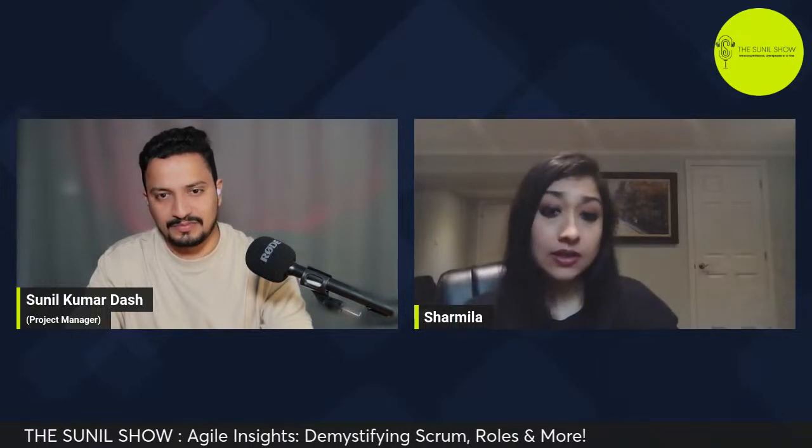Now let's say with all the things going on, with the bugs that are coming up, and with the dependencies that are also evolving while the development team is trying to develop that particular project, in the first sprint, although we committed to 40 story points, we were not able to complete those 40 story points. We were at 32 story points, right? Now, based on our discussion in the sprint retrospective, we will discuss whether we have overestimated our capacity while taking up 40 user story points to complete in this sprint. And based on that, we will decide the amount of user stories to take up in the next sprint.